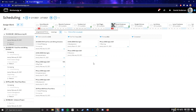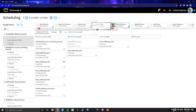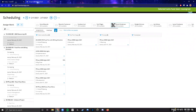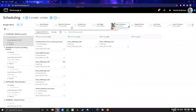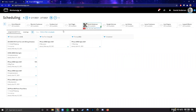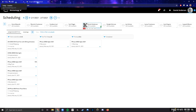You can also make reassignments from here. If someone has 10 or 11 hours in 'Do This Today,' you can click and drag tasks from that user and assign them to other users — you'll see a black bar appear around their names when you hover. This will update the resourcing hours as well, though you may have to refresh the screen. Additionally, you can create projects, tasks, and to-dos from this page, and create conversations and meetings if needed. The primary function is matching what's seen on the Today Creative page and allowing communication back and forth between a project or resource manager and assigned users.